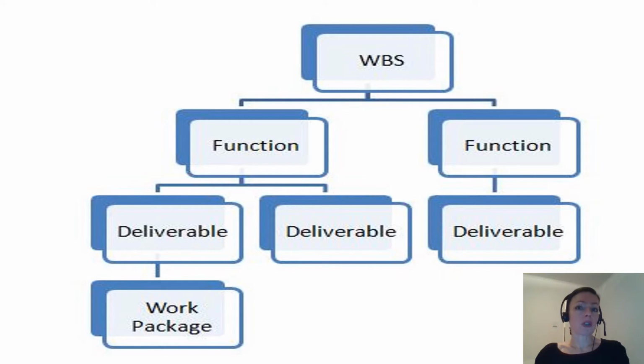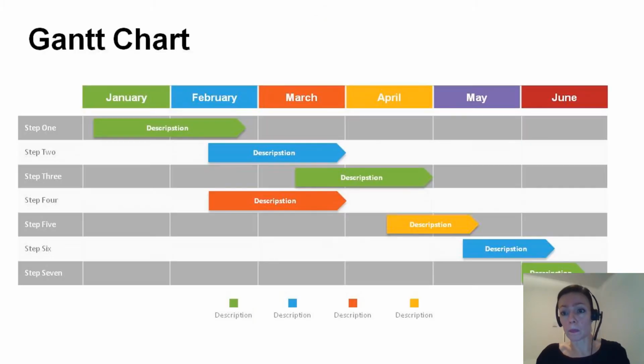For planning project scope and the work required to accomplish it, the work breakdown structure can be used to present the work packages and tasks in a hierarchical top-down direction. Typical breakdowns include products, work descriptions, geography, and department. It allows a complete view of the project and thus helps with the follow-up too.